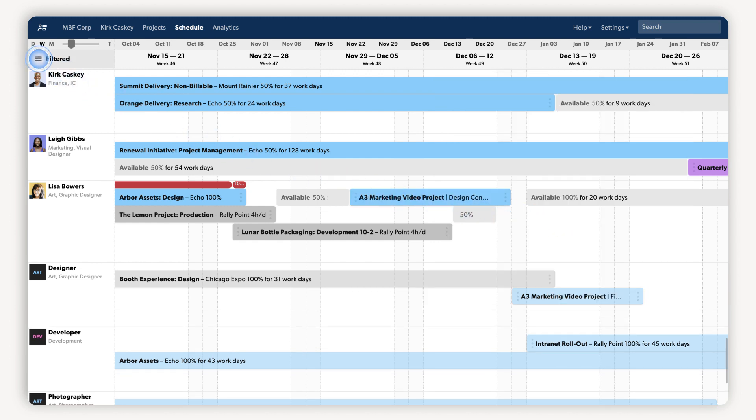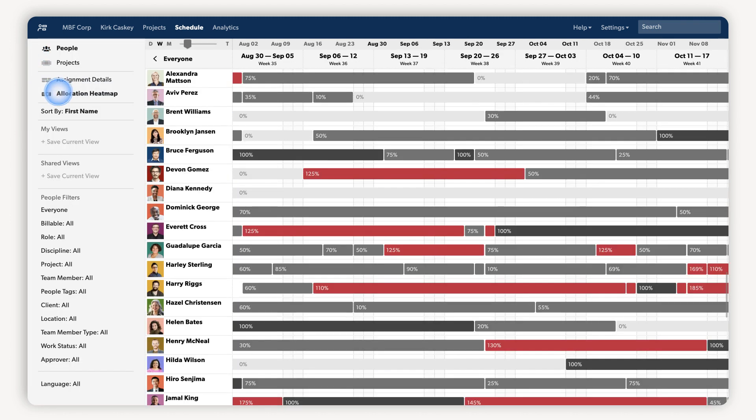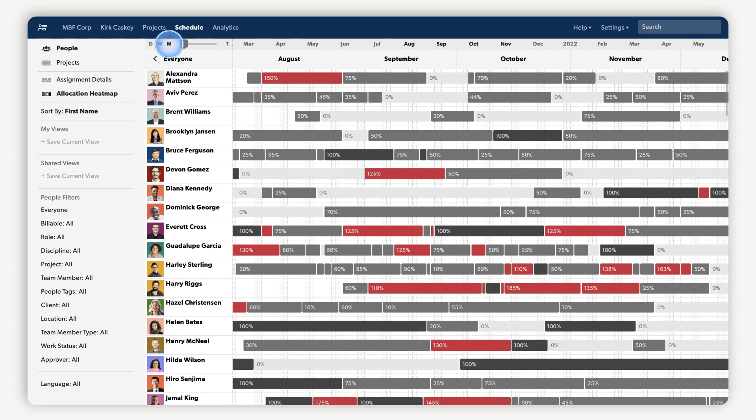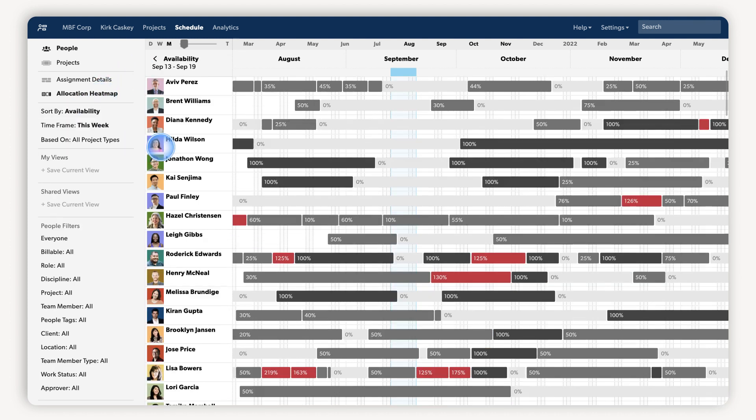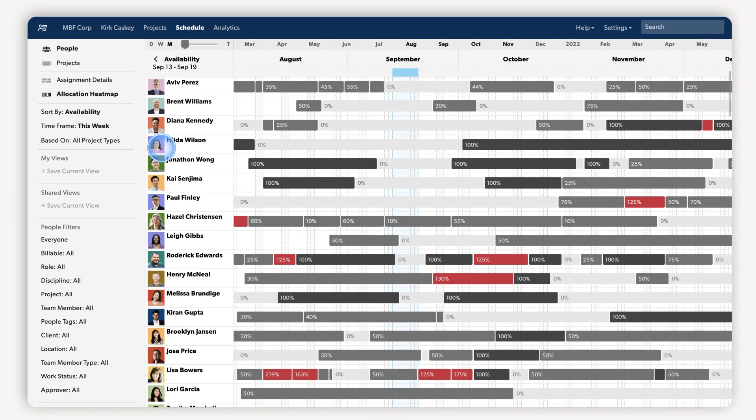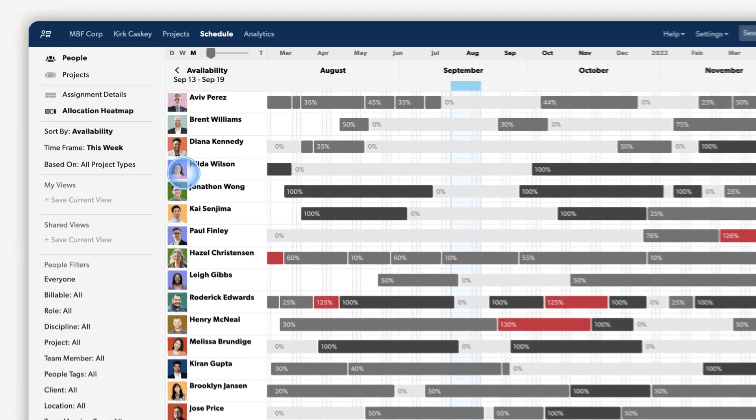You could also use the allocation heatmap to get a bird's eye view of your team's capacity. You can change the filter to see a week or month view, see who has room to take on more work, spot trends and availability, and balance your team's workload by reassigning work as needed.